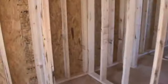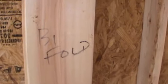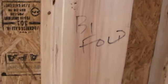Another thing that we'll do is mark on certain ones, because sometimes in different houses we go back and forth between using bi-hinge doors and bi-fold doors for closets. This is a smaller house. There's not a lot of room in it. So we're going to a bi-fold door. So looking good. In this punch list right here, the only thing that I'm really coming up with that is left for the framers to do is we don't have a pull-down attic access in this door. We just have a scuttle hole, which I've already gone over with them. I'm going to go ahead and look for a good place to mark where we want to put it, and have him come in this afternoon off of another one of my jobs and go ahead and cut the scuttle hole access. So we're good to go.